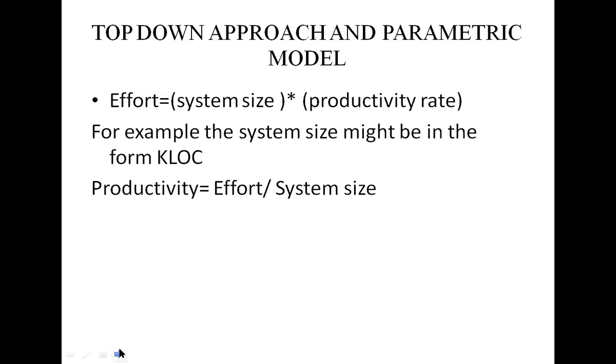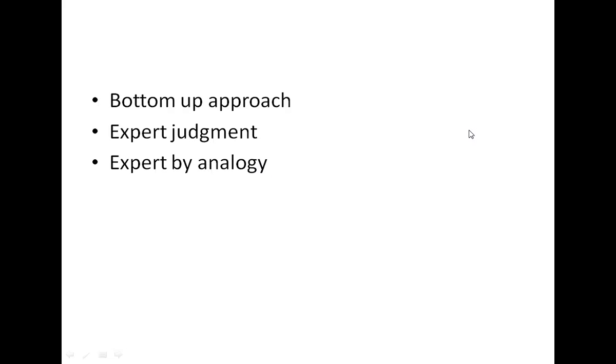Next we move to the next topic, that is the bottom-up approach. Here the project is broken down into a number of tasks, and each task is decomposed into a number of subtasks. This is repeated until you get a task for each individual. The bottom-up part comes in adding up the calculated efforts for each task to get our estimate.